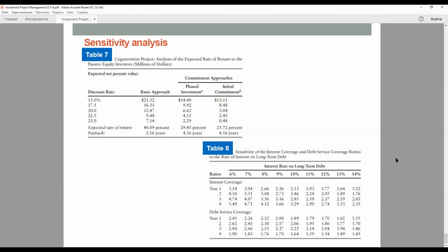The 15-year electric power purchase agreement and 15-year steam purchase agreement mitigate output price risk. There is still a risk that revenues might fall short of expectations because of unplanned outages. However, this risk is small because the operating reliability of similar plants has been well documented.